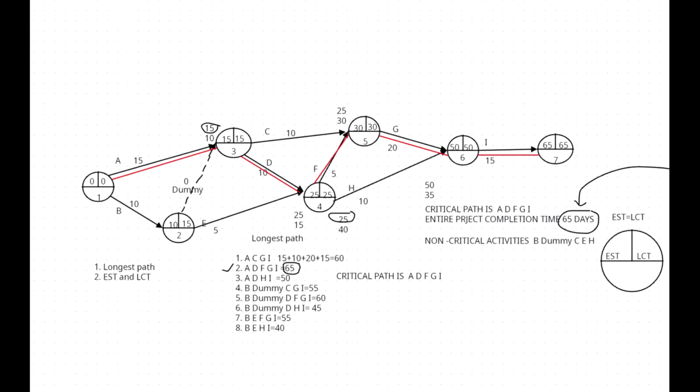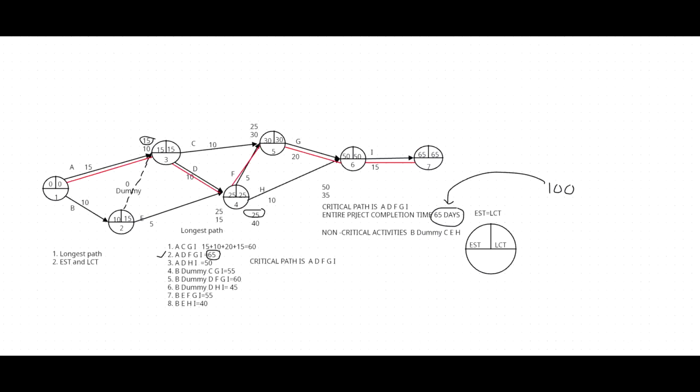Actually, we are going to complete the activities simultaneously. That is the reason. Now you can see the starting point, event number one, we start A and B both. To complete A requires 15 days, to complete B requires 10 days. We start simultaneously. When I start A, simultaneously we start B also. Then after 10 days B is already complete, and another 5 days are required to complete task A fully.